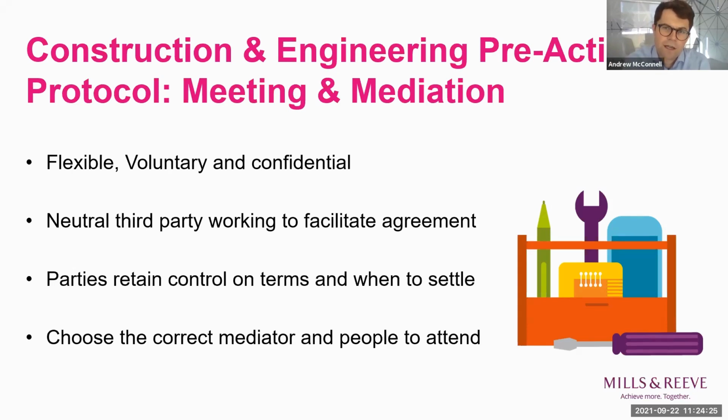Another factor is settlement authority. Do you have the requisite settlement authority before the mediation? And by that, I mean from any insurer clients and indeed from the insured client, but also, do you have somebody there authorised to sign the settlement agreement once it's finalised? That can be an important factor on the day.